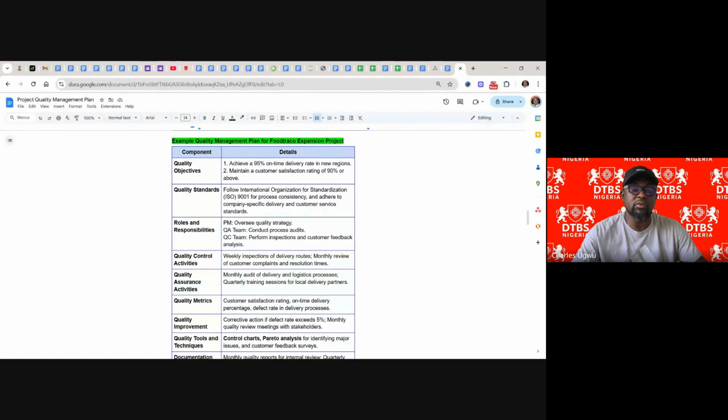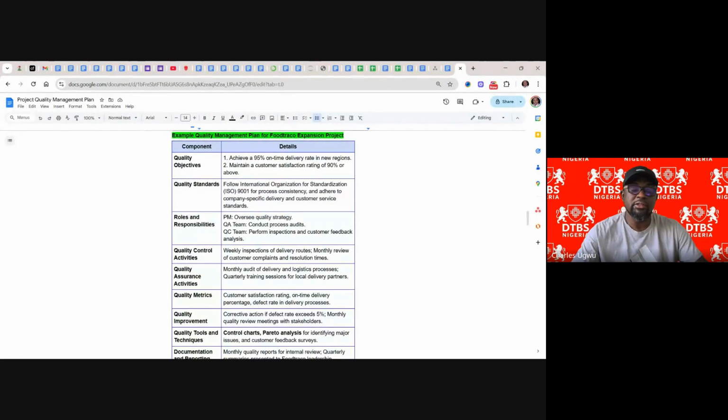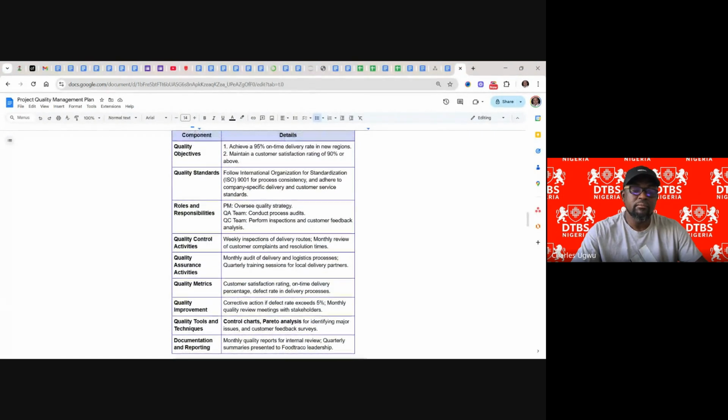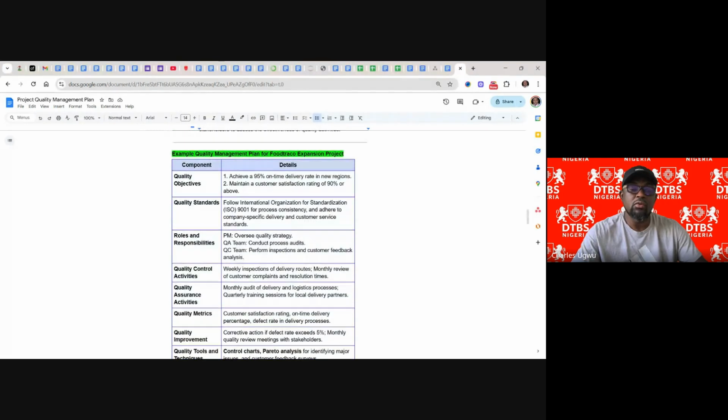It is a live project. We captured this from a live project, and you can customize it to suit your own project. We followed the components we identified and customized them into this project. Quality objective one: achieve a 95% on-time delivery rate in the new region. Number two: maintain a customer satisfaction rating of 90% or above.